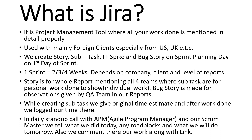Coming to the daily standup call — let's assume your shift time is 11 to 8. So at 7 PM, one hour before the shift ends, there will be a daily standup call with your scrum master from your company and the APM (agile program manager) from the client side. All four team members connect there. The leads speak first — what they have done today, any roadblock, and what they will do tomorrow. They also mention their subtask IDs, and the scrum master checks whether comments and the link to work (proof) have been provided. Make sure every day you log eight hours and all comments and links are properly embedded.